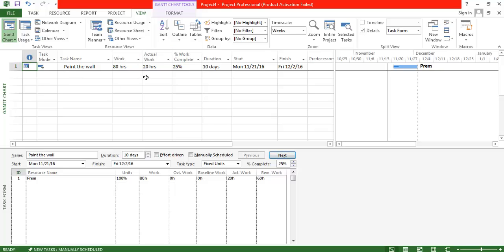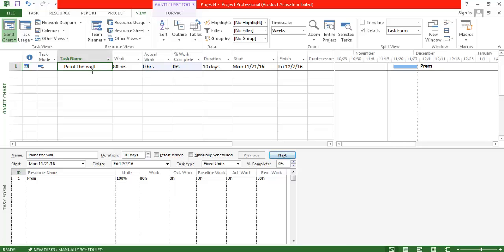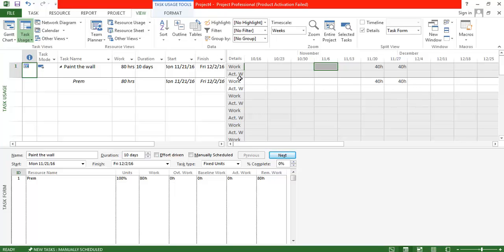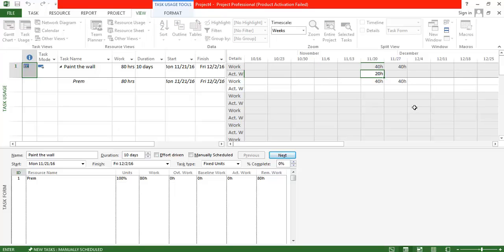If you want to give the actual work completed for a specific week, the behavior changes. Let me remove the actual hours back to zero — I'm not going to add the 20 hours at the task level. Instead, I'm going to assign the 20 hours of completed work in the task usage view for a specific week. The actual work has been cleared and is no longer reflecting there. I'm saying that for this particular week, only 20 hours were completed. Let's hit Tab and see how the work completion changes.